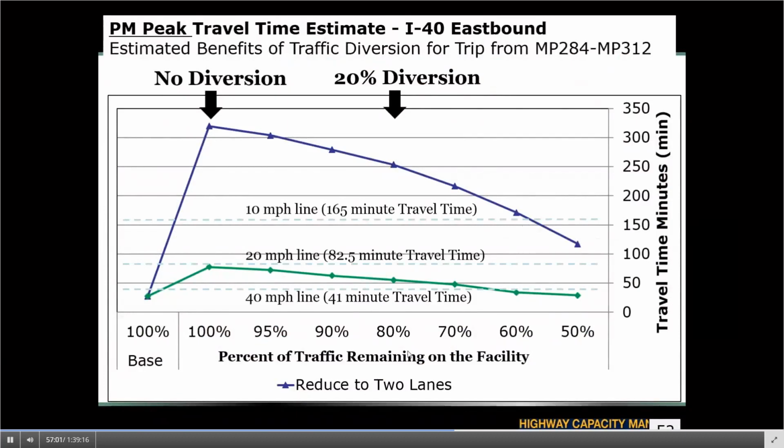respond in that fashion. So with the 3-lane pattern, it was evident that even with a 20 to 30% diversion, the average travel speed could be somewhere in the 30 to 40 mile per hour range, which was in the peak hour, which was deemed to be a realistic target. A work zone of this magnitude would not feasibly eliminate all congestion, but it would be much more manageable.